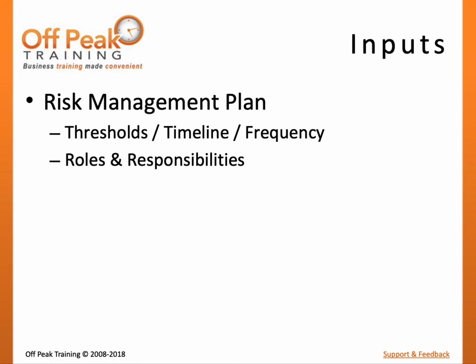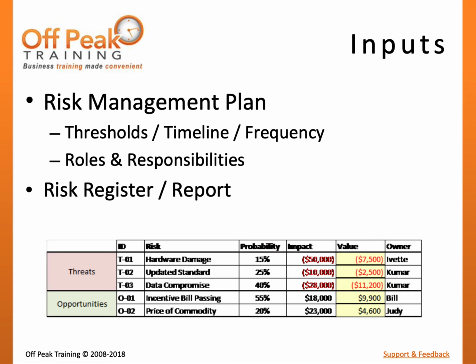Other relevant items in the Risk Management Plan can include definitions of risk thresholds and their relative urgency for responding to each. For example, it may be determined that all risks of low severity will simply be accepted. The risk register will also be a key input as it lists the individual project risks along with attributes such as priority, quantitative value, or risk owner. A risk owner is the person that is responsible for ensuring that an appropriate response strategy is selected for a particular risk and that the corresponding actions take place.